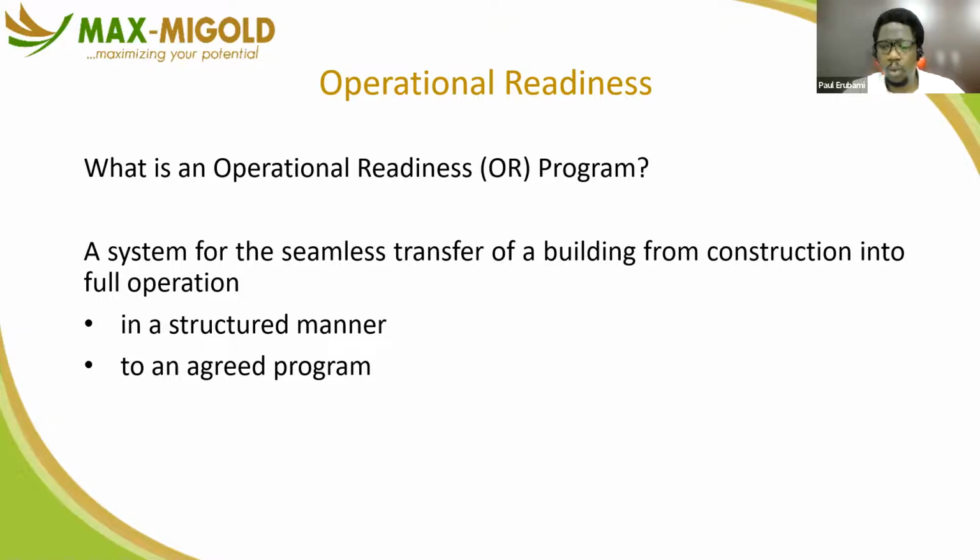Most owners, developers, and company executives see you as a bottleneck, a hindrance to the speedy delivery of the process, if all you do is try to drag everybody's hands down to make them do the right thing. So they don't see it as the right thing at that point. What you need to advocate for is an operational readiness program. An operational readiness program is a seamless system for the transfer of a building from construction into full operation in a structured manner, to an agreed program.